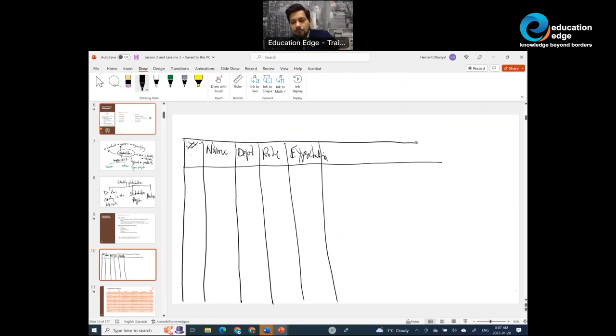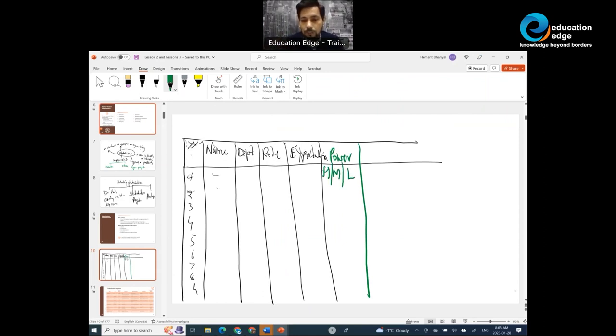But looking at this information about stakeholders right here, all these different stakeholders listed, this does not help me understand the priority of the stakeholders. So how do I understand the priority of the stakeholders? To understand the priority of the stakeholder, we further identify certain attributes of our stakeholders. For example, things such as what will be the power of a certain stakeholder. It could be high, medium, or low. What would be the influence of the stakeholder? It could again be high, medium, or low. What is the level of interest of the stakeholder in the project? It could also be high, medium, or low.